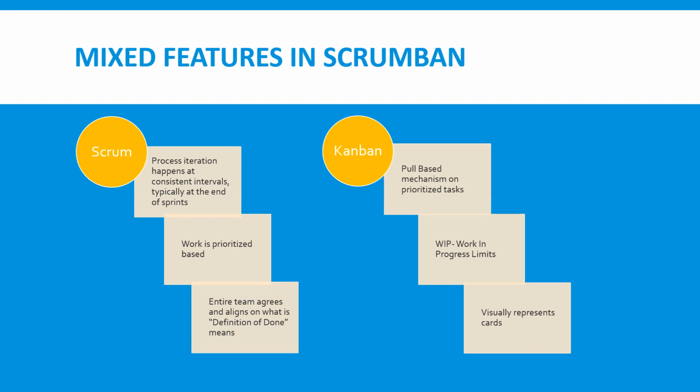It should be moved to the done state. It means whether the development of that story is acceptable by the definition of done. Means the acceptance criteria written by the product owner, reviewed by the team or the Scrum Master as well, which is actually given by the customer or end user when the requirement gathering happened in the discovery phase, right? So once those definition of done are approved and matched, then only we can put it as done.